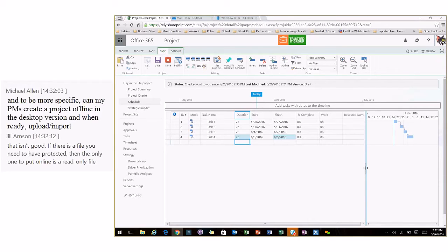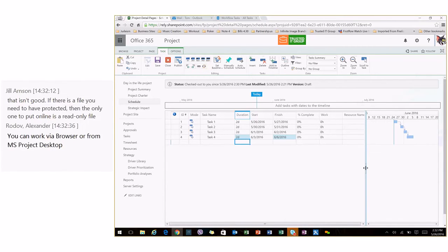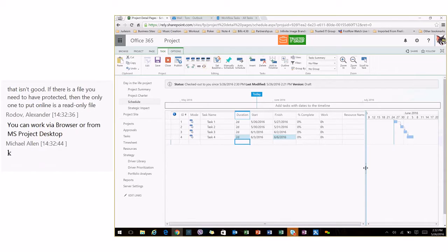To make your PMO process that much more automated, if there's a schedule that you adhere to every single time, a cookie cutter template, you can assign that schedule template to a project type. So every time you create that project type, you wouldn't have to manually enter these tasks and durations like I would. However, you still would be able to edit it afterwards.